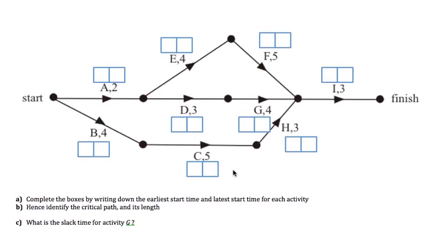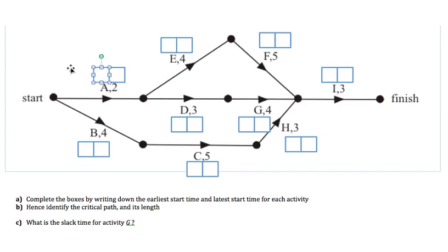This question is asking us to firstly complete the boxes. Remember, in each box the first number is the earliest start time and the second number is the latest start time. We work from start to finish to firstly get the earliest start times, and then go back the other way for the latest start times. Activity A comes from the start, so it has an earliest possible start time of zero — it's not waiting for any other activity and can start right away.